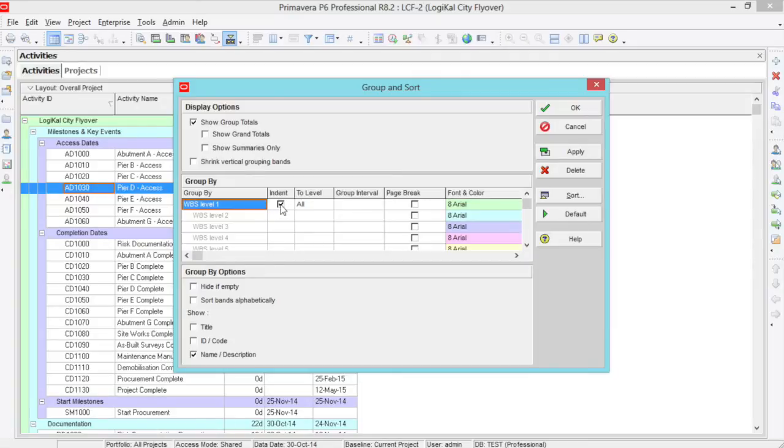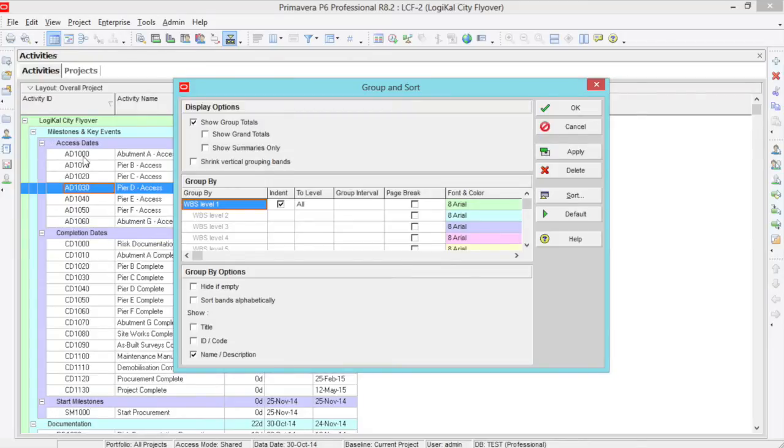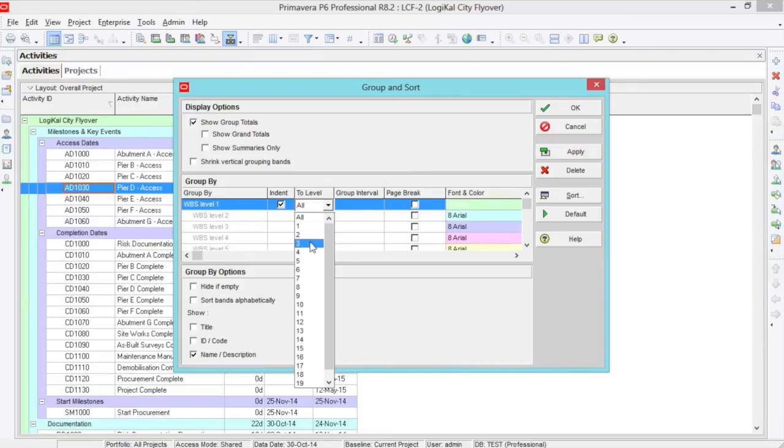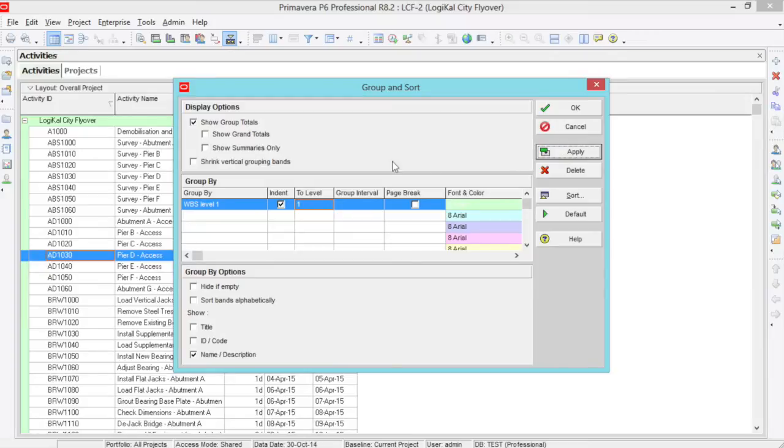If you have your WBS indented, it will show an indent per WBS level. The to level is a simple tool where you can decide whether you want your program to finish at WBS 1, 2, 3, like so. This shows different groupings and can help with what you may want to achieve in your view.